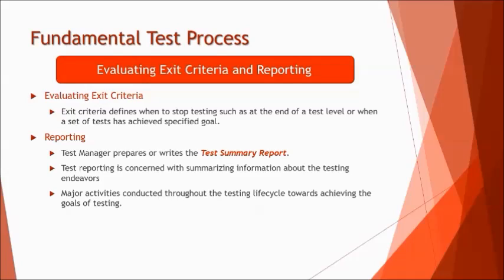The only thing which happens next is preparation of the test summary report. The test summary report is prepared by the test manager, and it consists of all major activities conducted towards achieving the goals of testing. Remember, in test planning we defined certain objectives and the scope of testing. So in the test summary report, we target all those major activities like test analysis, test design, test implementation, test execution. A summary of all these stages put together is called the test summary report.